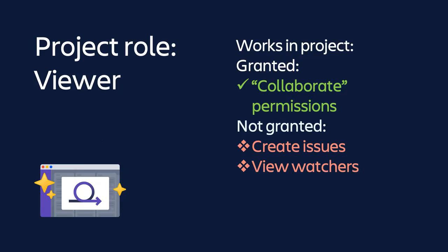And then we have the viewer role. The viewer role grants users permission to view but not edit issues. They can add comments and attachments, but not edit issues. In terms of project access, this is the least impactful role.